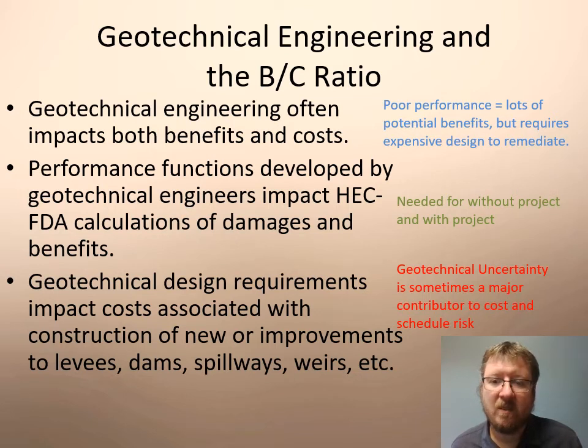So if we overestimate the poor performance, so basically we say it's going to fail all the time in kind of a conservative approach, we might be raising the benefits of this equation inadvertently as well as the costs, and so we might make the wrong decision.